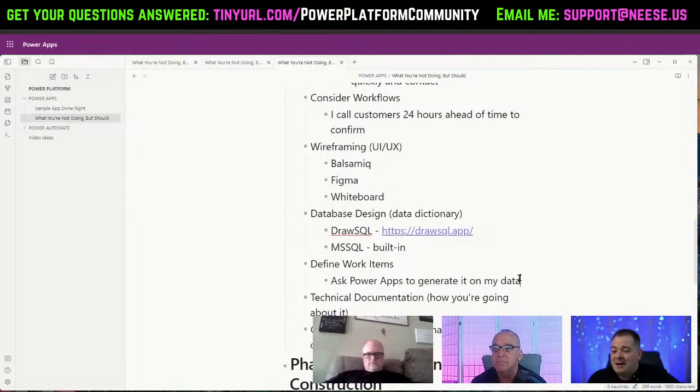Hey, go off and do this. Okay, that might take me a day to do. Then you give another post-it note to another developer. Hey, you go off and do this user story. Maybe they're working on two different screens and two different files, so it's not that big of a deal. And they come back, oh, hey, that's done. And during the stand-ups, you tell each other what you are each doing. Like, oh, I'm doing something similar to that. Can we get together later after the stand-up and go over that? Yeah. So you'll actually define all your work items here.